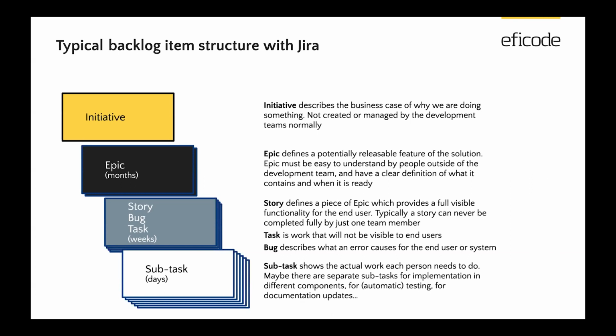Yeah. Of course, we sometimes have teams who decide that we've worked together for such a long time that we no longer need to use subtasks to make everything work. In that case, the team can decide, well, let's just create the story. And then we know that one person will be doing UX design, another will be implementing the front end, another the back end, and somebody will be responsible for testing, and they can do it all without the subtasks. But when a team is starting up and starting to utilize Jira, I would strongly recommend trying out the subtasks for a few sprints at least, just to see that everything really works like that.